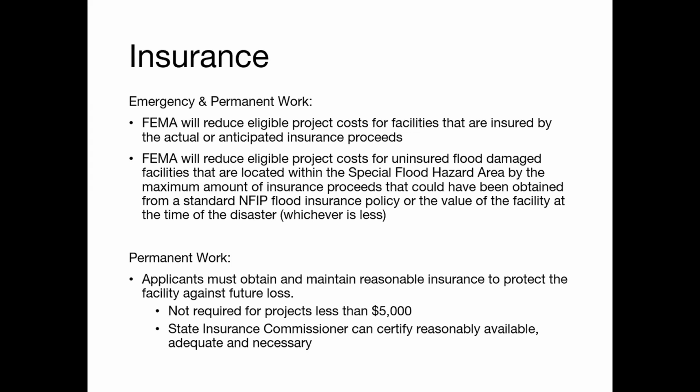On permanent work projects, FEMA will require you to obtain and maintain reasonable insurance to protect facilities against future loss. This is not required for facilities receiving damage of less than $5,000.